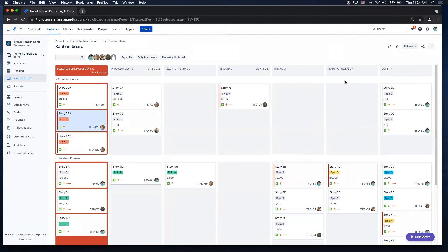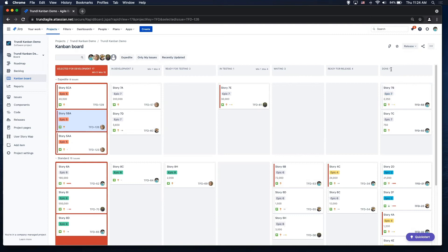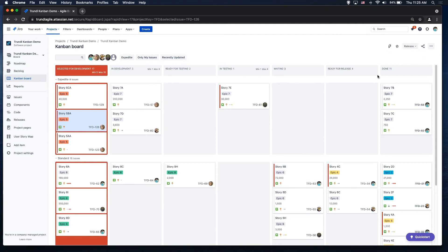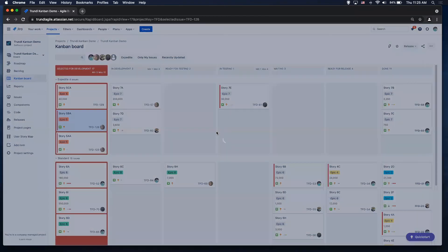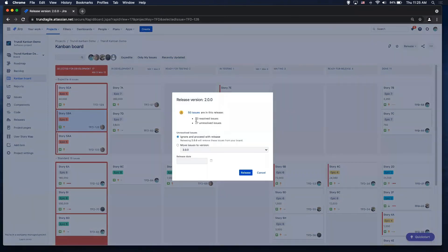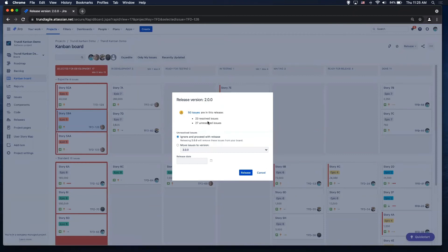And then ready for release, throw it in there, another wait status. And when I'm ready to release stuff from my board, I just throw it into the done column and I have my little release button up here. I could select 2.0.0. I'm not going to release it, but you'll see there's 50 issues in this release. 23 are resolved, 27 are unresolved. It's going to ask me what I want to do with the rest that are unresolved.